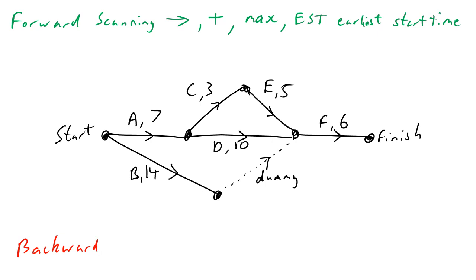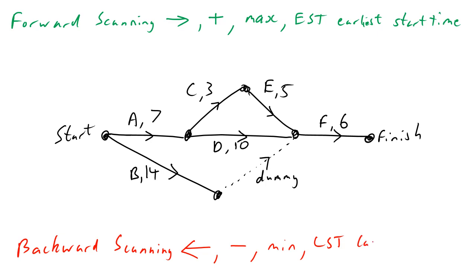Backward scanning: we go backwards against the arrows, we subtract, we take the minimum, and we get the LST — the Latest Start Time.